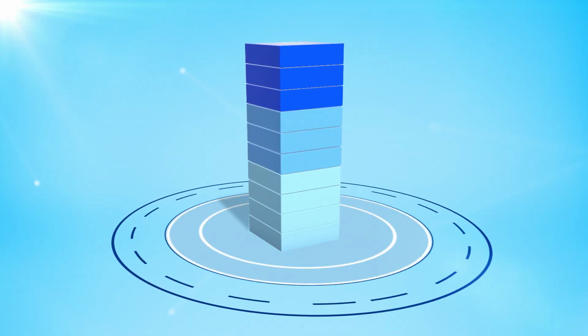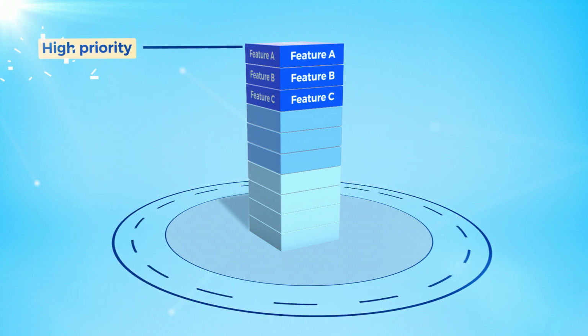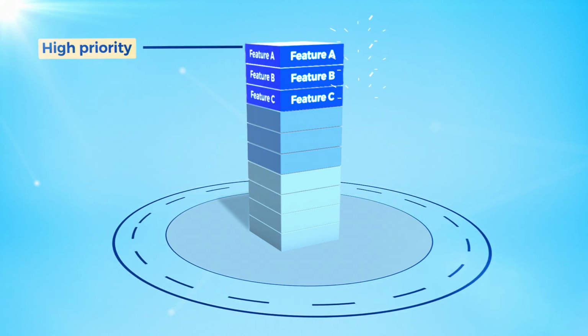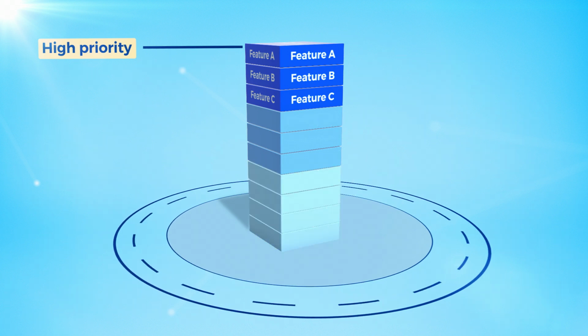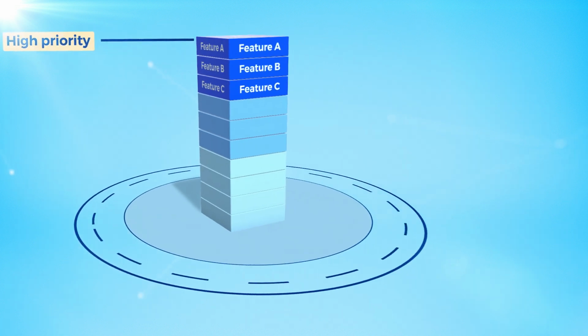With Agile being iterative and incremental, the focus is on delivering the highest value items first. So if you're starting with highest value items first, then you know that you've at least tackled the things that are the most important to your stakeholders.